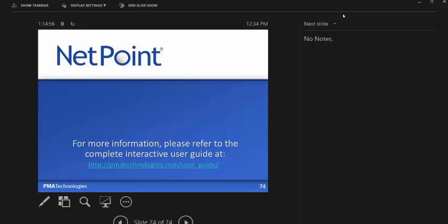Yes, sir. And the issue of subjective durations, to clarify that, rates and amounts. I came from the nuclear industry, and one of the problems you have there is if you're doing something inside the reactor building as opposed to something in the turbine building, that rate and amount is going to be vastly different because of the amount of dress you have to do, the paperwork involved in getting to the location, and how hard it is to manage stay times in the location. It might take you twice as long to work on a valve.